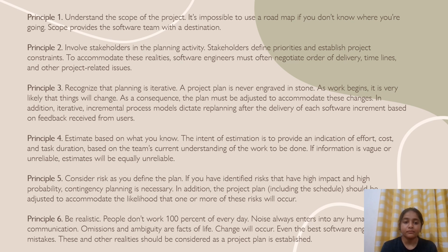Principle 5: consider risk as you define the plan. If you have identified risks that have high impact and high probability, contingency planning is necessary. In addition, the project plan should be adjusted to accommodate the likelihood that one or more of these risks will occur.